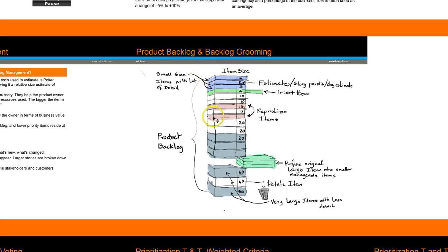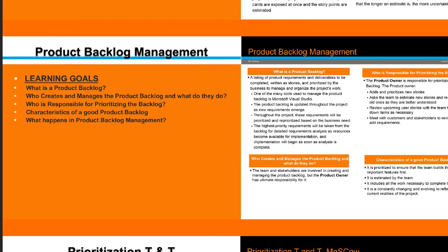And then this is a typical product backlog where you have the story point estimates on this side for the items in the backlog, the different stories and the different tasks that you have in the backlog. Then you are going to prioritize these stories. You are going to estimate, using poker planning, how long each story is going to take. Are you going to insert new stories? Or are you going to take out and delete the old stories that you really don't need? So someone needs to manage this backlog, create this backlog, and insert the stories in this backlog, which we are going to see in detail when we get there. So that's the product backlog.